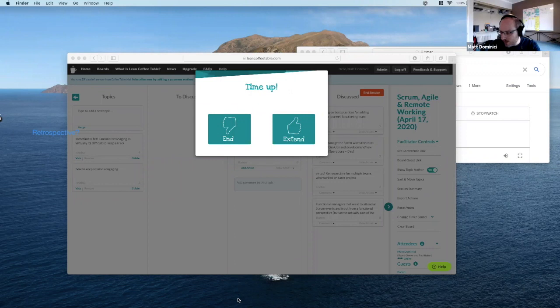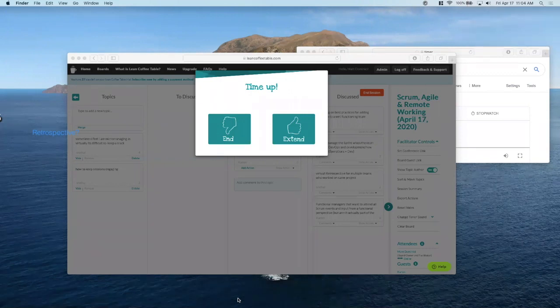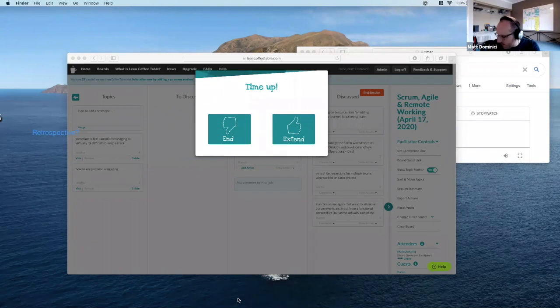Yep. Just to point out, we're over time, but I'm happy to stick around and keep talking. There's an experiment that you can consider with this, because one of the things I find in that case is, because we have the QA people and development people, there's a handoff and all that sort of thing. One thing you can try to break through that a little bit is, as an experiment within a sprint, try to promote the idea of swarming on just one item at a time, at the beginning of the sprint at least.